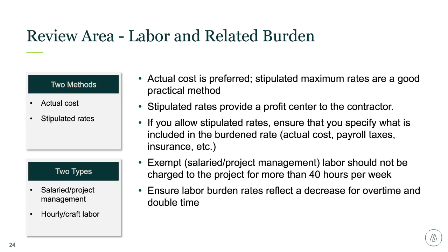That is, I find when contracts have no markup on labor, there's not really a benefit for the contractor to have more bodies on the job than they should. So the job's typically staffed perfectly. If the labor rates include a markup, a big one, there's benefit to the contractor to potentially overstaff the job.